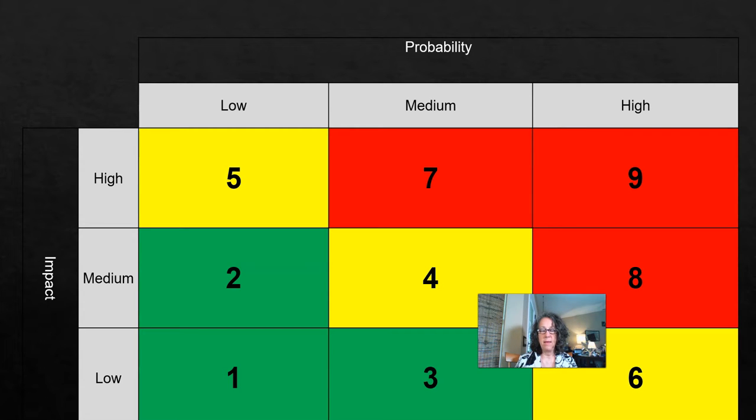And then this allows for prioritizing the investments that are available to do risk management for the project, and to prioritize those resources to focus on the risks that have these highest numbers, right? They would be the highest priority ones. The risks that have the highest probability of occurring and the highest impact on the project. Those would be the ones that would be most beneficial for the project team to tackle.